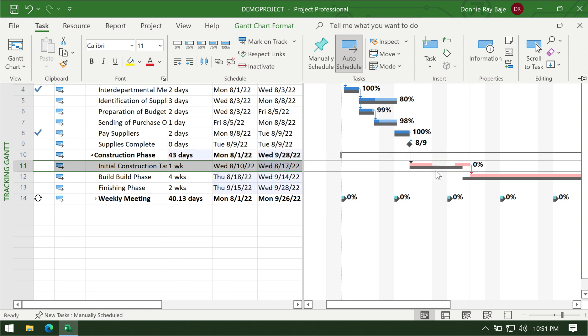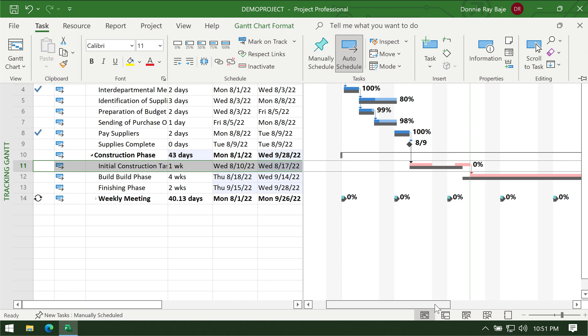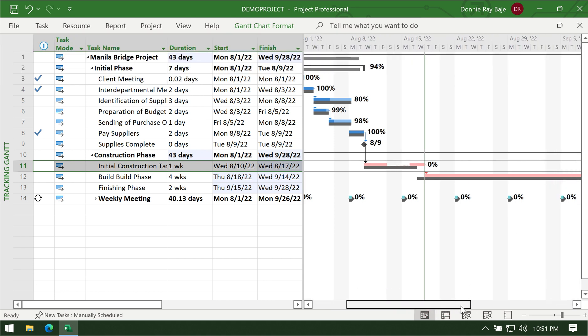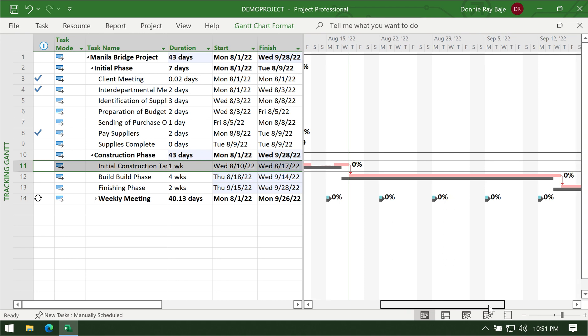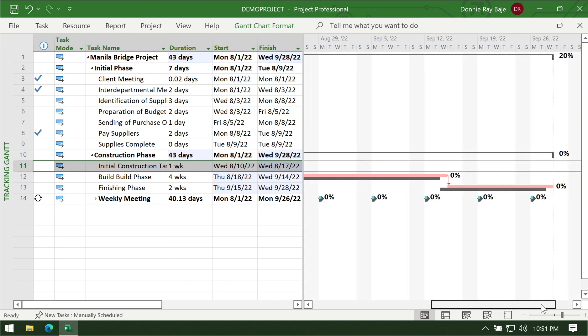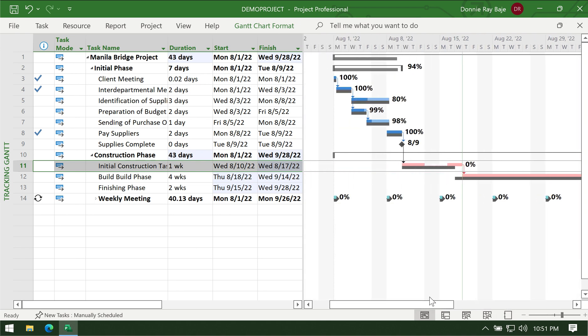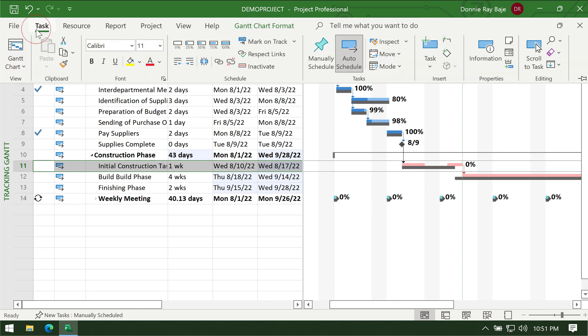I'm going to split this task to another day and you will notice that the gray bar doesn't change because it's the baseline. On the other hand, the colored bars will update and you will notice that the project will now be delayed compared to the original plan.